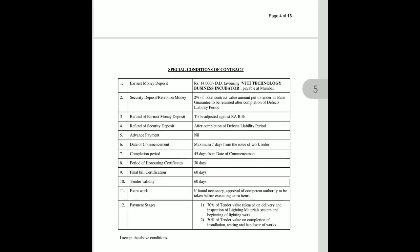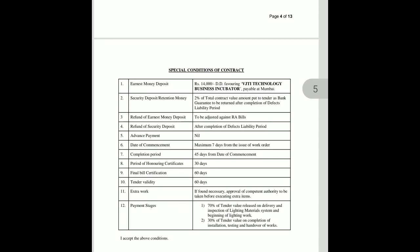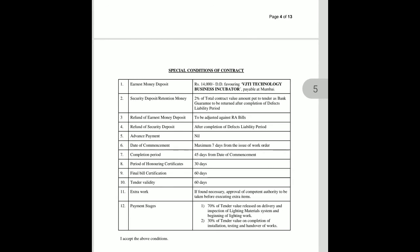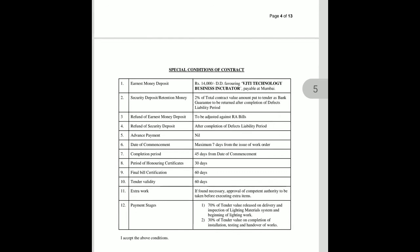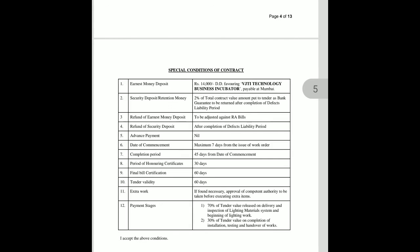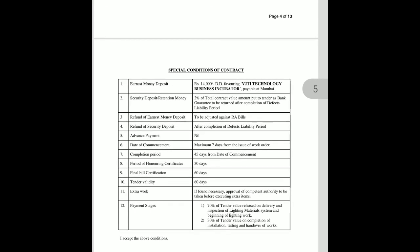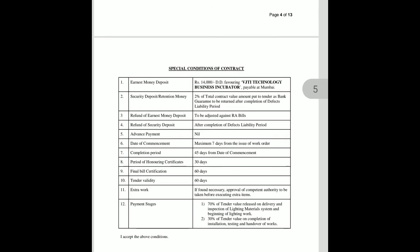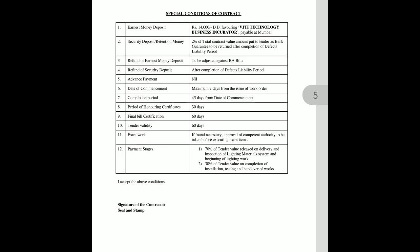These are the general requirements of the owner, along with stamp and seal of the contractor. For the special conditions: the earnest money deposit is 40,000 in DD form, favorable to the VJTI Technology Business Incubator, payable at Mumbai. The security deposit is 2% of the total contract value as a bank guarantee, to be returned after completion of the defect liability period. The EMD is to be adjusted against the RA bill.